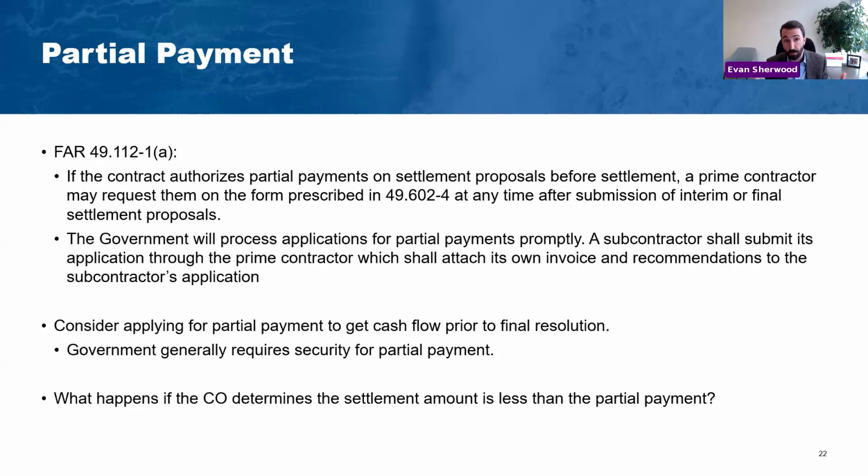This can get you some cash flow. This can be really hugely beneficial. But it's important to remember these are advance payments. They're kind of in the nature of a financing payment, which means the government could make a final determination that the payment was improper and ask for it back plus interest. So you usually want to narrow this to things that are really not even close to disputed.